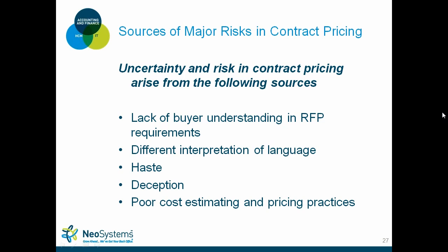Sometimes, and that's why it's really good to have broad participation when developing the cost volume and pricing, one person could understand the language in the RFP one way, and another person reads it and it could be completely different. Deception: if you have a pricing person that's solely responsible for pricing, they might say, yeah, I've completed the pricing for you, I've used these rates. Come to find out maybe the rates are completely different or incorrect. So that's why having multiple resources work on pricing is very important.